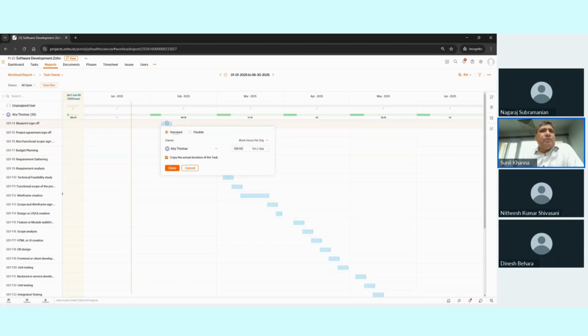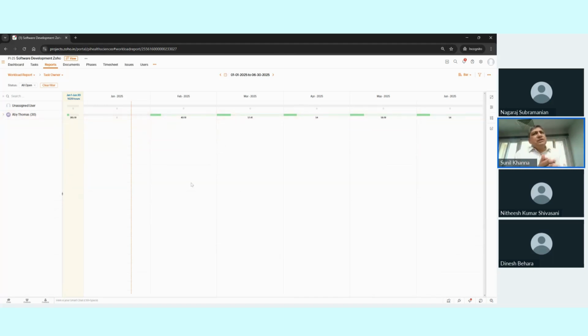You can open that particular task. We name that particular task, and in each of those tasks you can see how much work is allocated for that person. So that way, when you view this, you will be able to see which persons are overloaded, which persons are underutilized, and that will give you a very, very strong tool to move tasks from one person to the other person.